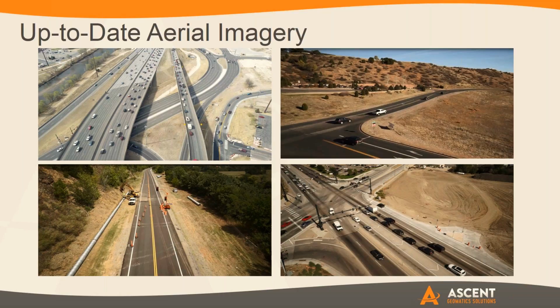And then up-to-date aerial imagery, just photos. It's amazing. If we're out there at the front end setting control, you want to see what a project area looks like ahead of time. We have certified commercial pilots on staff, and these are small little drones. We can send them up and get some photos to start the scoping and scouting, or do it as actual progress reports too. What does it look like as a photo snapshot? Since we're already out there construction staking or doing design work, let's just send a bird up and take a few photos. It's amazing what people can get out of that intelligence.